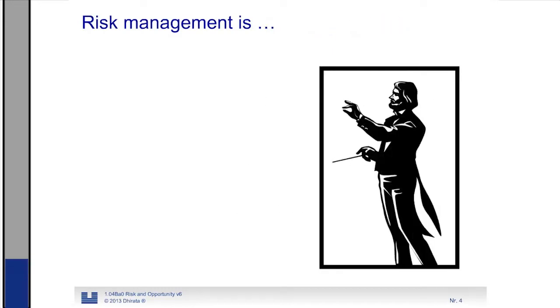In risk management, but also in opportunity management, there are five steps. The first step is identifying. The second step is analyzing. Then we plan responses. Now, these three are done at the start of a project. Then we've got our go decision. So we start executing the project and we start delivering the work packages. Then the risk management activities are monitoring and signaling. And if we see new risk, we identify again, we analyze, we plan responses, and so on.